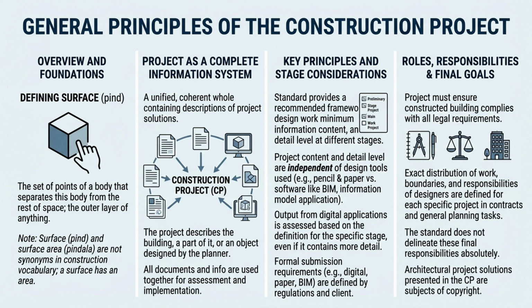A standard sets a recommendation framework for the minimum level of information and detailed requirements at each design stage of the construction project. The type of design tool used, such as pencil and paper or a digital tool like BIM, doesn't affect the required project content or level of detail. Both traditional and digital outputs are evaluated using the same definition for each specific project stage, regardless of whether the digital version provides more information. Requirements for the final format and submission, whether digital or paper, are determined by the client's instruction and legal regulation.